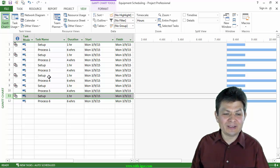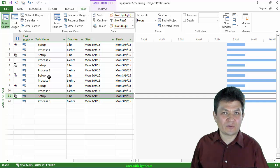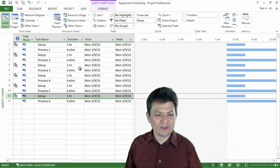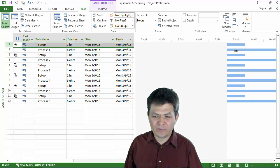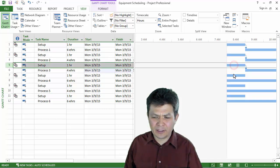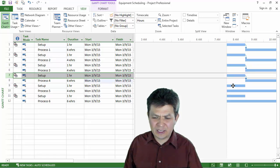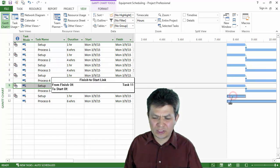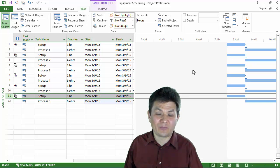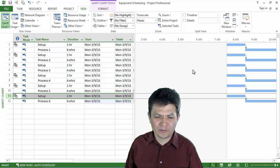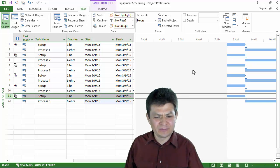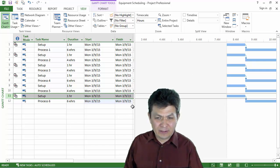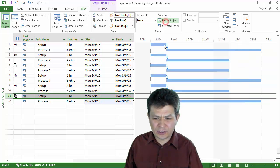Now I'm going to link each of the setup tasks to the consecutive process 1, process 2, and so on. I'm going to link like this and like that. I'm setting up a trigger task for each one of the processes. So you can like equipment setup or turn on the equipment, whatever it is, but I need some duration in there.